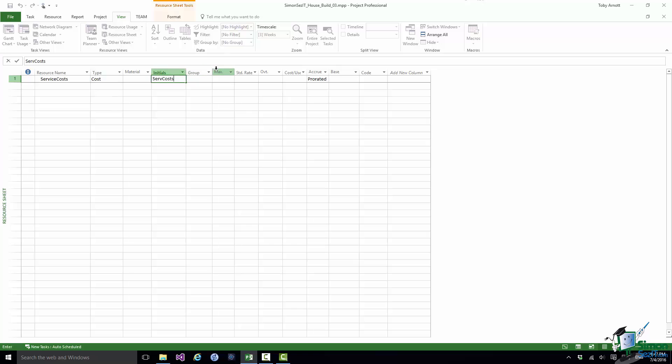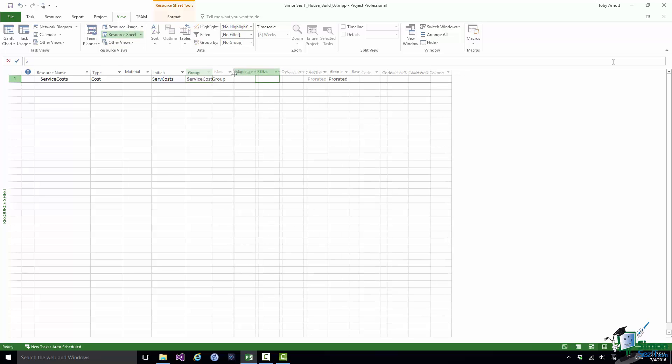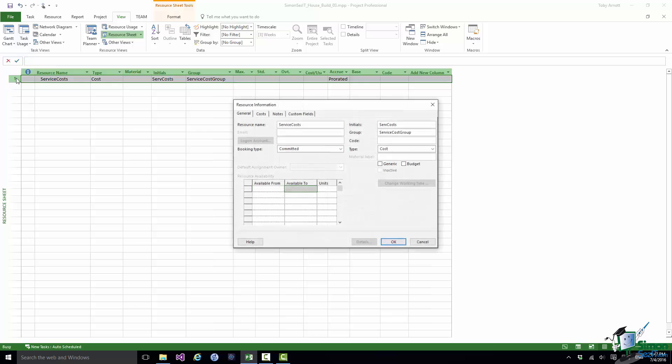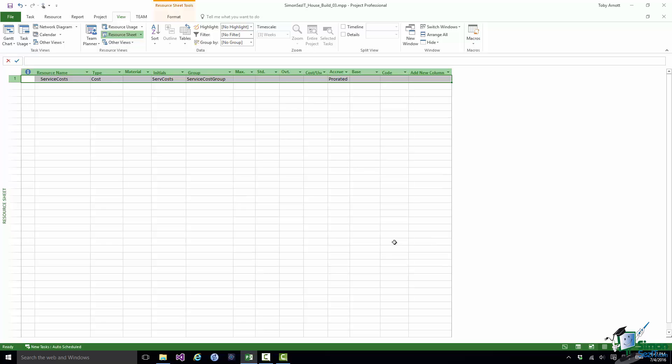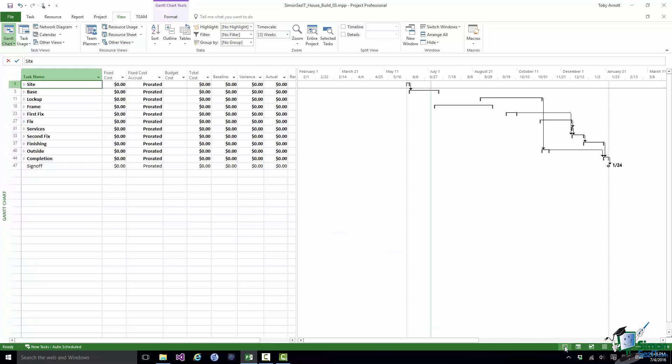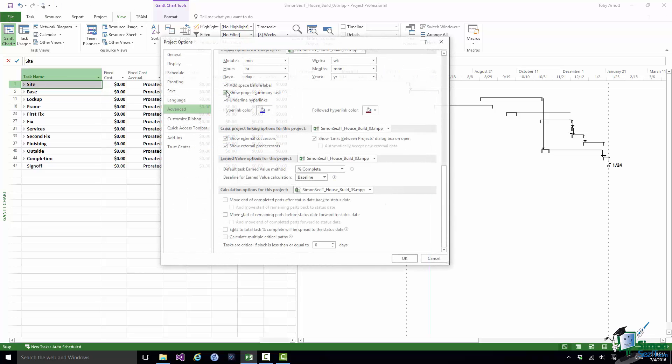I'm also going to create a group. I'll explain the use of the group in just a moment. I'm going to open up that resource and I'm going to check the budget checkbox on the General tab to make it into a budget cost. Now what I'm going to do is to assign it to the whole project. In order to do that I need to assign it to the project summary task. I don't currently see the project summary task, so I'll show project summary task.